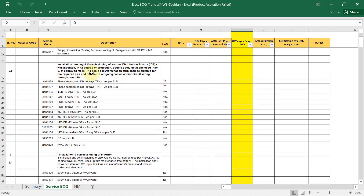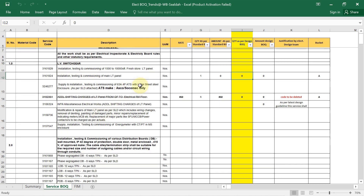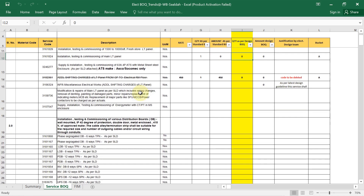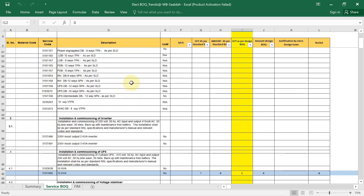Scroll down to see the LV switchgear section. In our project we are not using LV switchgear, so leave it as it is. Here it says installation, testing and commissioning of various distribution boards — wall mounted, IP42 degree of protection, double door — as per SLD. We'll fill that detail later.